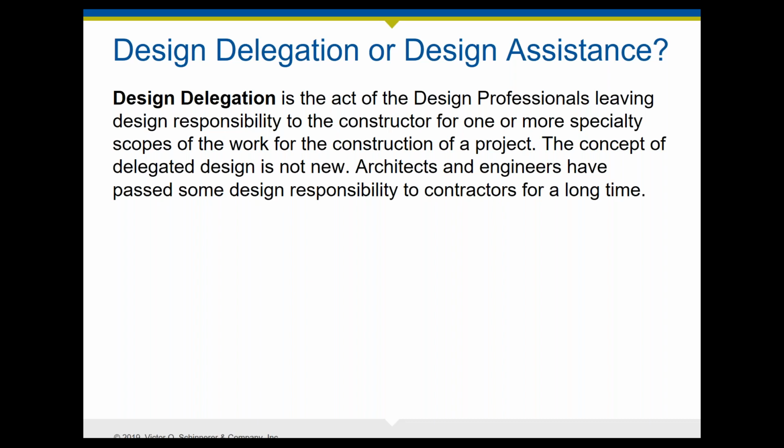Typically, either a construction manager or a general contractor, which usually is not a licensed design professional or does not have licensed design professionals on staff, delegates that to a specialty contractor, and that specialty contractor will typically employ licensed specialty designers who will generate and be responsible for the design of the delegated portion of the project. And the intent of that is to comply with and achieve the performance criteria specified by the contractor.